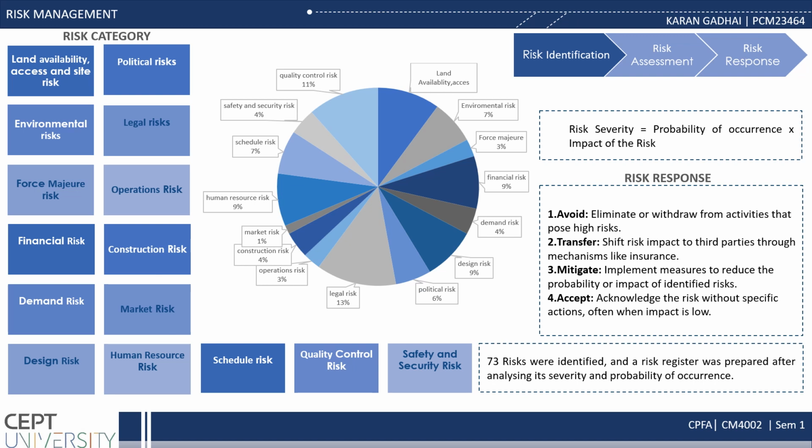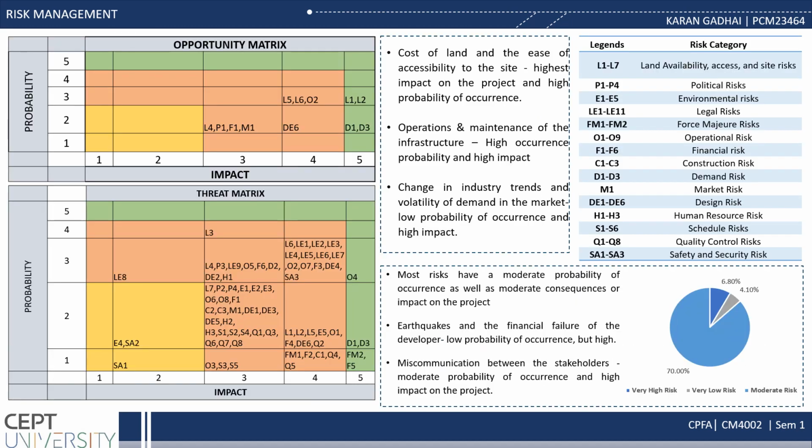The severity of risk was also assessed in the risk register based on the probability of occurrence of the risk in the project multiplied by the impact of the risk in the project. Further, risk assessment was done. In risk assessment, evaluation of risk is done to determine the potential impact and chances of occurring on the project. Quantitative values are given based on the probability and consequence of occurrence in the project. The values provided are used in developing effective strategies.